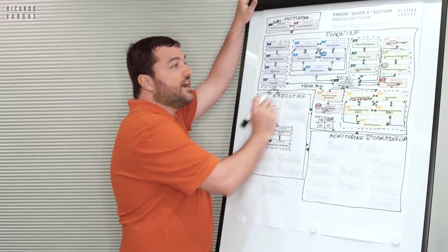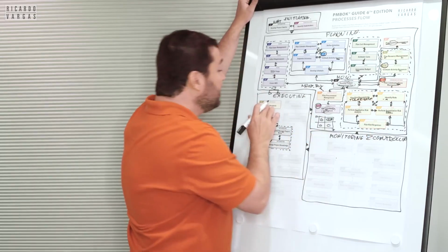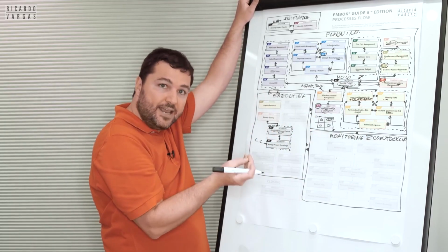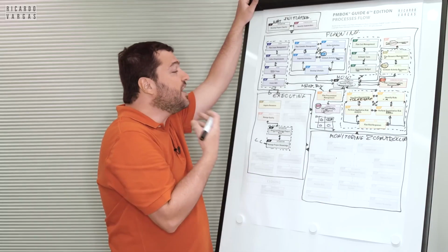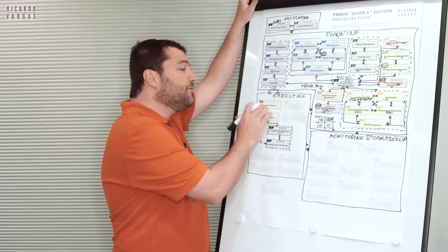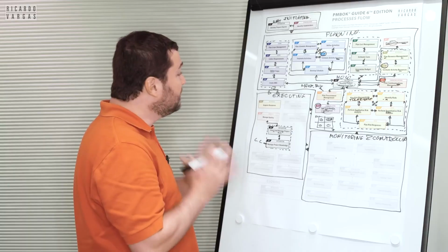Why we do it here and not here on the planning? Because I always try to do this as late as possible because this is money. So resources, I always wait until the last minute. Of course, look, this is not mathematics. This is project management.